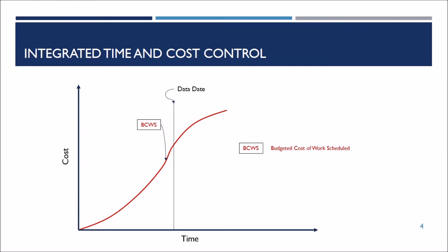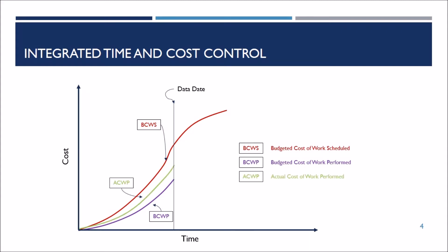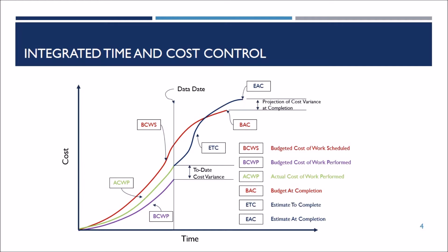Now, let's assume that you selected this data date for updating your project. You may find that this curve is your earned value, which is the percentage of completion multiplied by the originally allocated budget. But this curve shows the actual cost to date. Here you can find the difference between the earned value and the actual cost — this difference is known as cost variance. This point is the budget at completion based on the originally allocated budget. This blue curve indicates the estimate to complete, which ends up with the point indicating the estimate at completion.